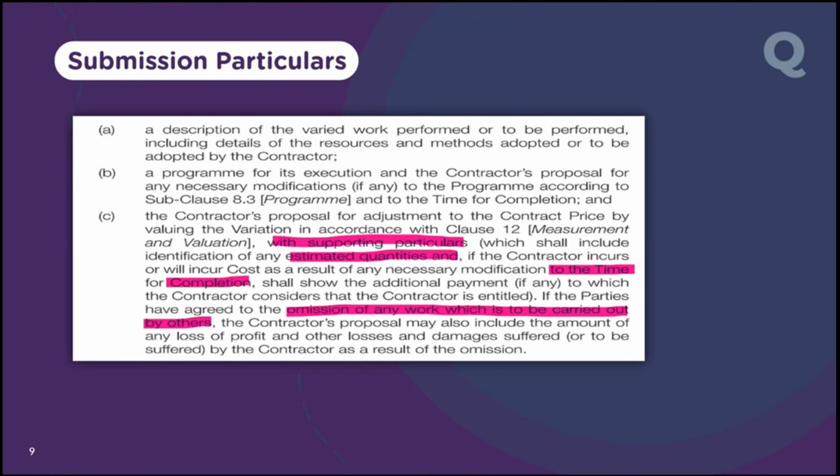Then of course your measurement as per the contract: you open the drawings, identify the quantity, then price it maybe as per BOQ rate, maybe a new rate, a star rate. But in each and every case, please ensure you provide all the substantiations. There should be quantity backup from the drawings. And for the rates, if it's not a BOQ rate, you need to provide a star rate, and make sure there is substantiation in terms of quotation or LPO or whatever.